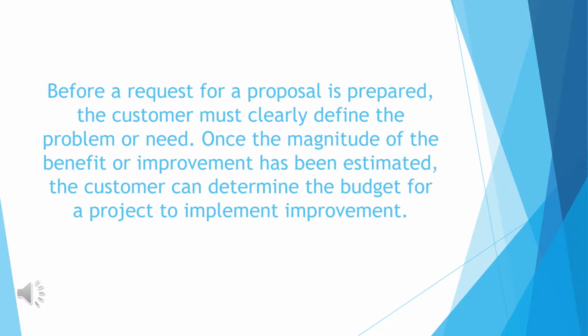Before a request for a proposal is prepared, the customer must clearly define the problem or need. Once the magnitude of the benefit or improvement has been estimated, the customer can determine the budget for a project to implement improvement.